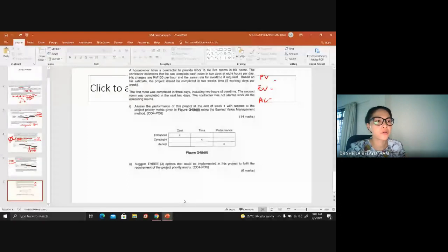Okay, so from the contractor perspective, you will give a bigger number. You have completed more, so that you highlight that your progress is actually well. On the other side, that is what you claim for every month. But on the other hand, how would the client pay you? Will they put 100% trust on what you have actually claimed for? Or would they have another party actually coming in to judge? So usually they will have the QS to verify the work on your side. But it's subjective lah, you see.